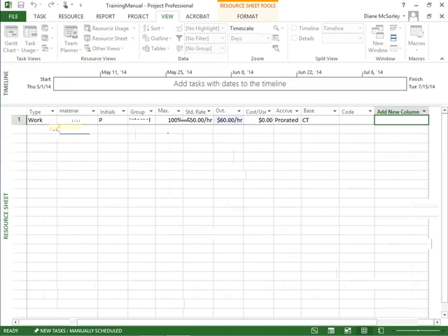All right, initials available. This will be an external. We will buy the paper from outside. And you can see the max units. Nothing pops in because, again, it's a material. And how much is it? Maybe $5. No cost per use. No calendar necessary. So your materials will go in like that.